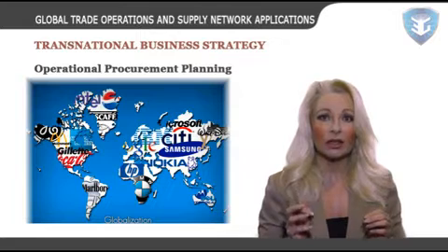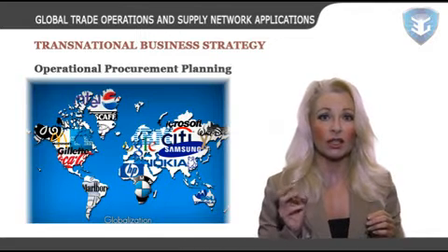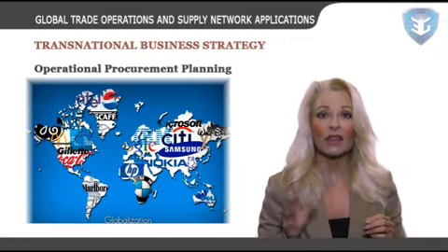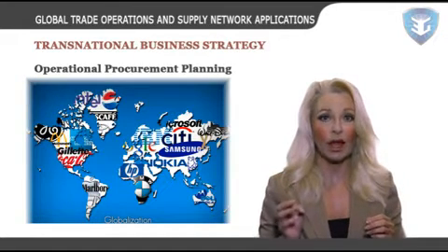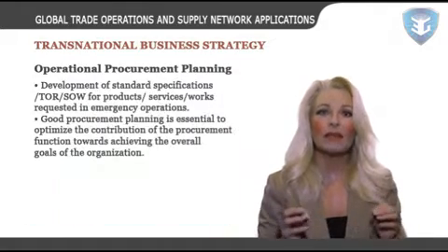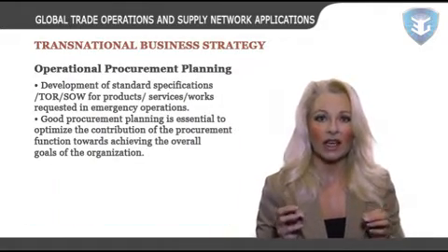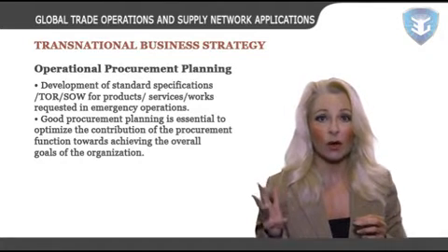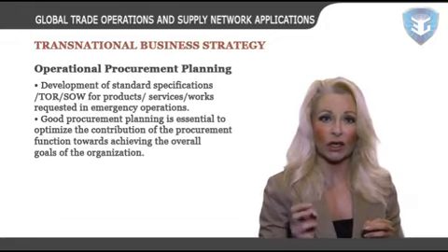Advanced identification of suitable suppliers of potential products frequently requested in emergency operations, including confirmation by suppliers on willingness to respond on short notice. Development of standard specifications, TORs and SOWs, for products, services, and works requested in emergency operations.